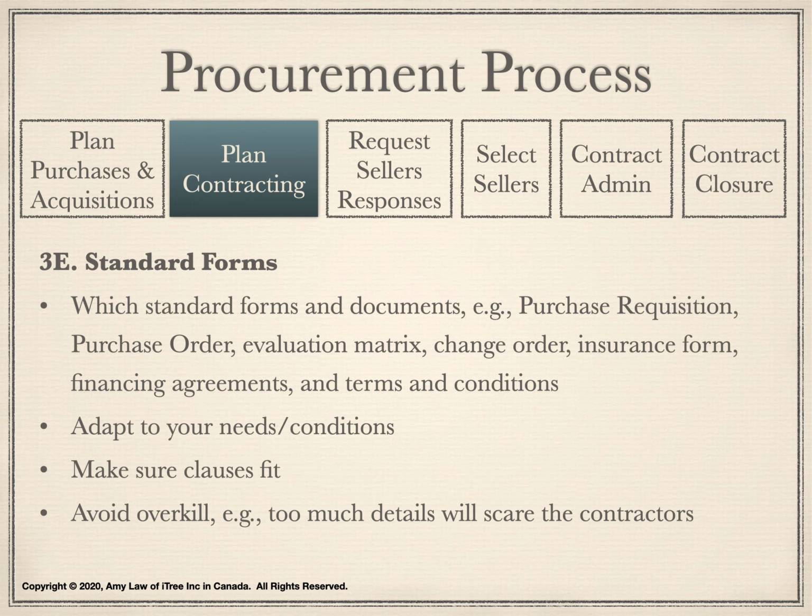Depending on your conditions, we select standard forms and documents. We make sure clauses fit. Some of the standard forms are purchase requisition, purchase order, evaluation matrix, change order, insurance form, financing agreements, and terms and conditions. We avoid overkill because too many details will scare contractors.